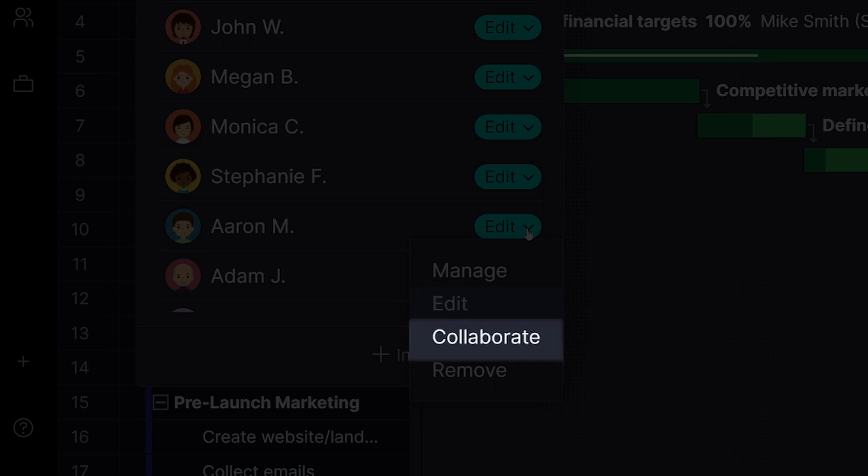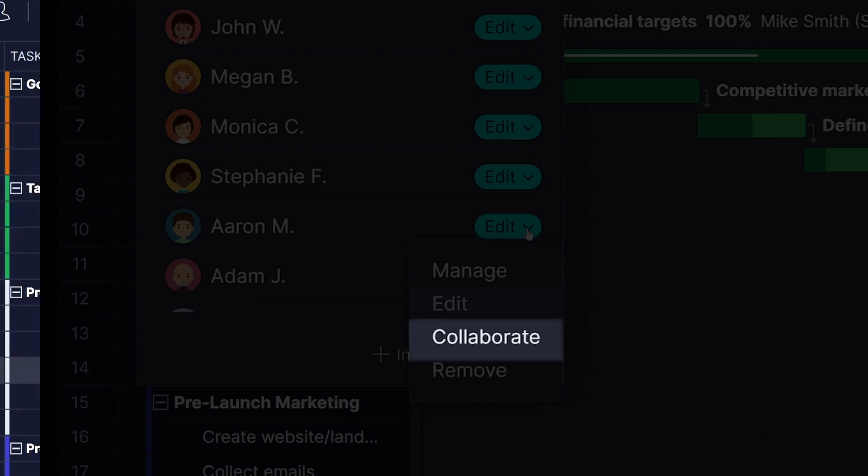And finally, a user with Collaborate access — the most limited of roles — can only edit task details, including progress, comments, files, tags, and log hours.